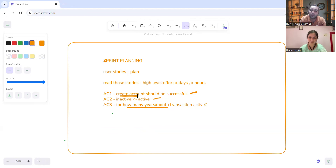During sprint planning you can discuss how many concurrent and parallel users need to be supported. If there are three user stories but it's not feasible to complete them all in one sprint of ten working days, you can discuss with the team to target only two high-priority stories instead.